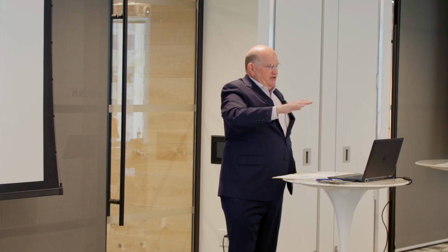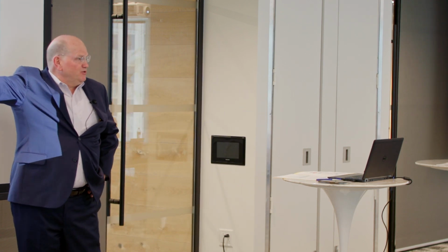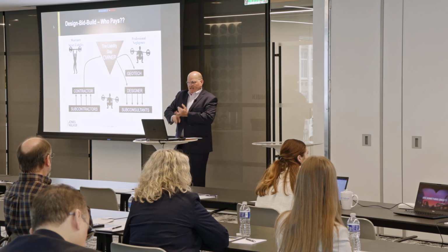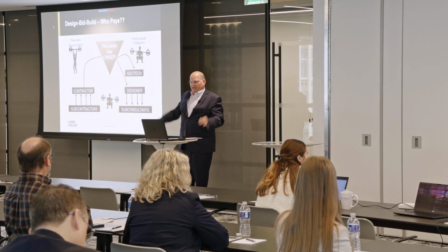The design criteria or the standard, unless changed in the contract, which is tough to do, and if you do it, you can't get an E&O policy on the contract. Liability is based on professional negligence. The breach of contract standard for a designer is still professional negligence. And the bottom line is that it's a very light burden for a contractor under an implied warranty theory of the design, but a much heavier burden for the owner going after the designer, because it's not just defect, damages, boom, liability. It's not strict liability.